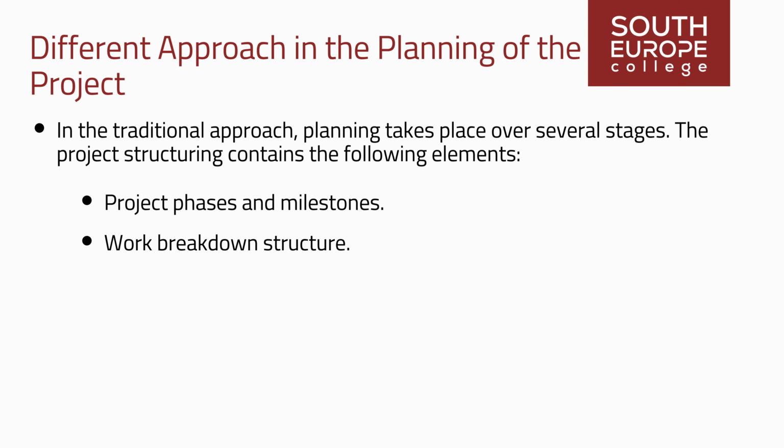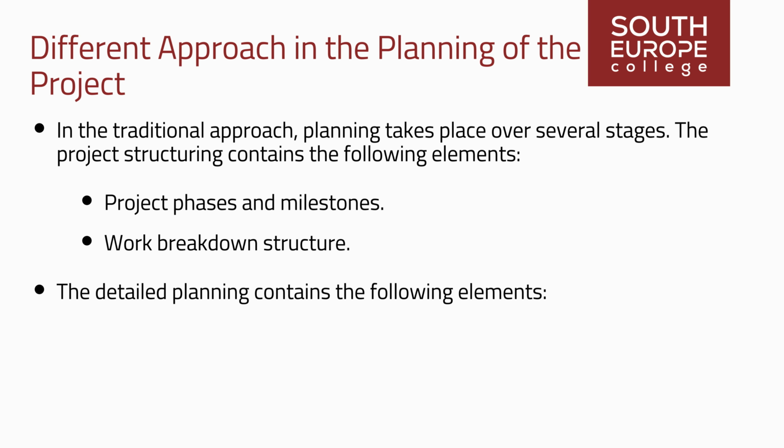In the concept phase, solution variants are developed for the requirements. For the selected solution variant, a detailed elaboration of the solution concept takes place. The detailed planning of the project is based on the solution concept. The detailed planning contains the following elements: schedule, resource plans, cost plan.